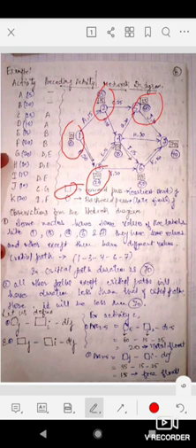From 0 to 15 we will do activity A. Only after A can we start C and D. So the square tells us the earliest starting time of activities C and D, which can start only after 15 days, because till 15 we were busy performing activity A.